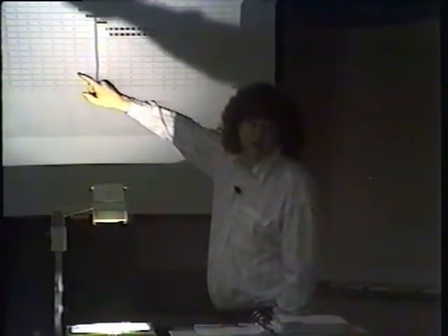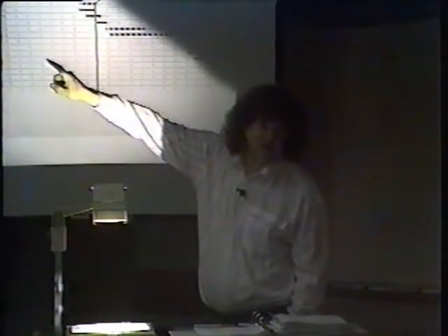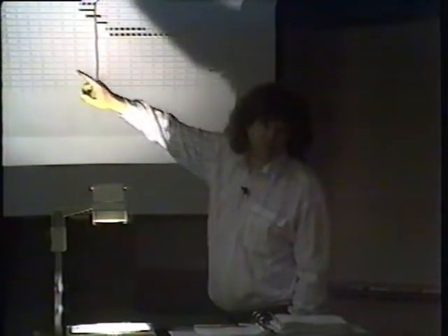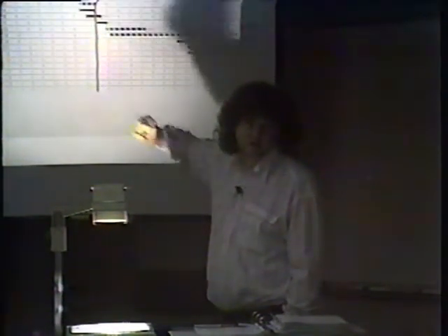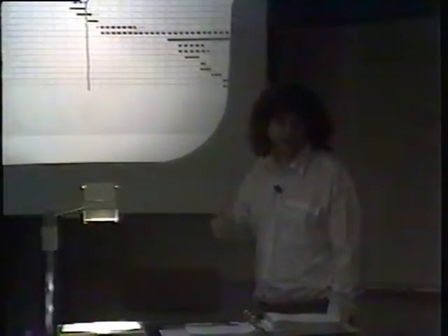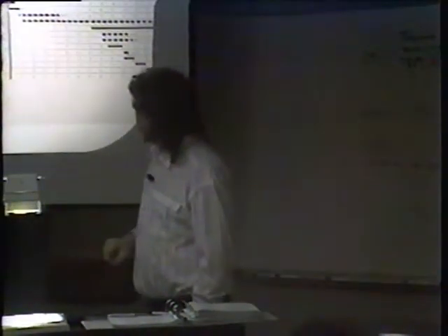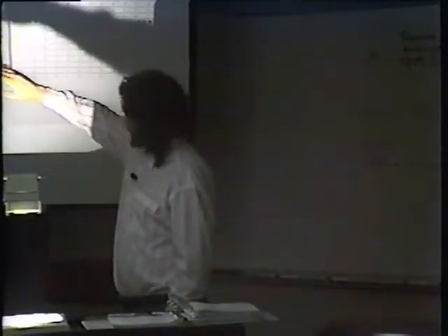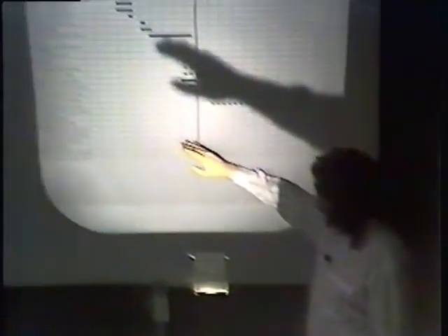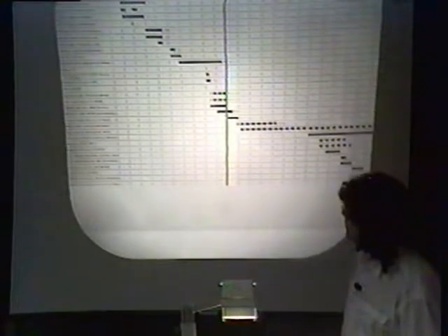I've got in here then purchasing your licenses, and it's occurring about 2 months before the actual install. You can start your licensing, and that takes paperwork and all kinds of stuff that's done bureaucratically until you actually get the paperwork back, sign, and pay for it. That's when you're committed to the licensing fee.